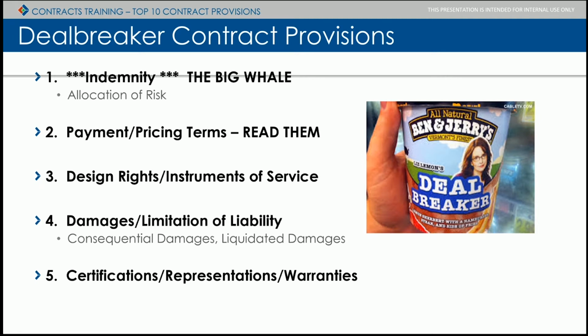All right. Payment and pricing terms. Goes without saying, we need to read them. The trend is I'm seeing less and less shenanigans with the payment terms. Really, it's paid if paid, paid when paid. We'll talk about that, and we really don't have too much flexibility on those, but at the same time we need to read them because you never know what's inserted in the payment pricing terms, and it really matters where we stand in the contractual line.